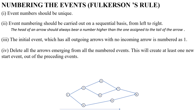Next rule is, delete all the arrows emerging from all the numbered events. This will create at least one new start event out of the preceding events. After entering the event numbers, remove the arrows for the corresponding event and the next events become the new start events.